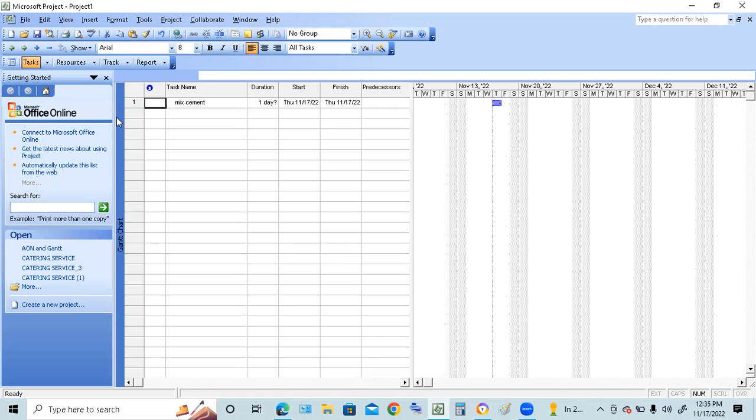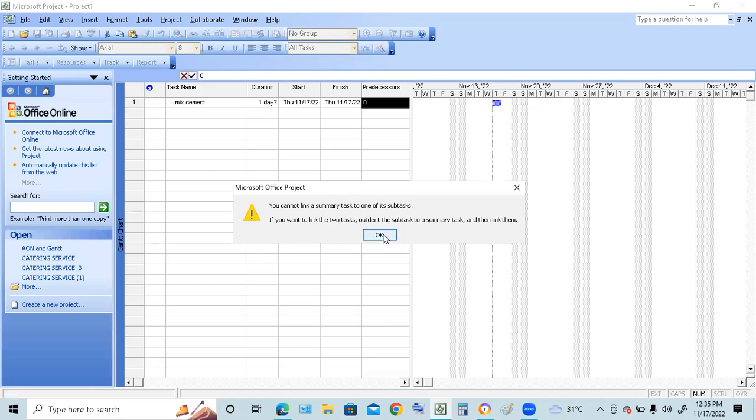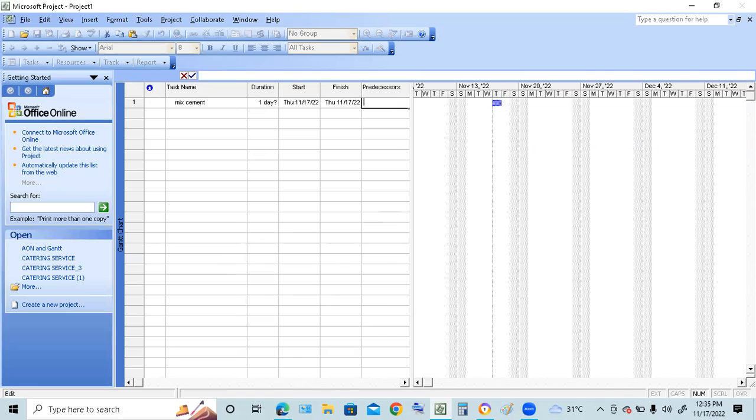So I'd call this activity 1 right here, and the predecessor for this would be 0, because it wouldn't have any predecessor. Then I can put how much duration I have for this. 2 days, right? And if you look out here, it's creating something like a Gantt chart.